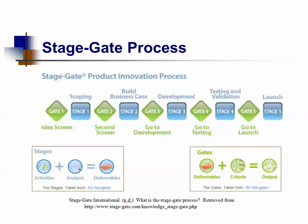Normally business analysts do this. Stage two is a detailed investigation involving primary research both in the market and technical areas, leading to a business case that includes product and project definition, justification, and the proposed plan for development. Stage three is the development — the actual detailed design and development of the new product, and the design of operation or production processes required for eventual full-scale production.